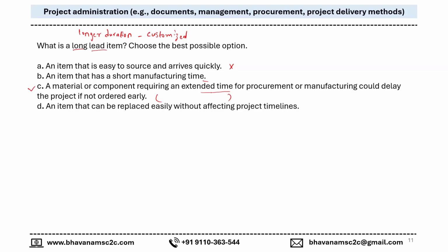As per the contract terms, he is supposed to order it a little earlier than he did, but he ordered it a little late, and later on there were certain things which were not foreseen, and there is a delay in the project now. If you do not order this particular product on time, there will apparently be some delay.